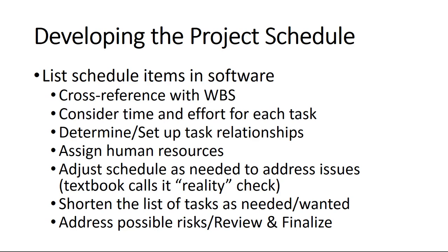So if you were scheduling a home remodel, as an example, you would want to plan to be done a few days early. That way you have some adjustment time if you need to make some changes, and that way you're still able to come in within the deadline. Once you have all of that addressed, you're ready to review one last time, finalize, and you're good to go.